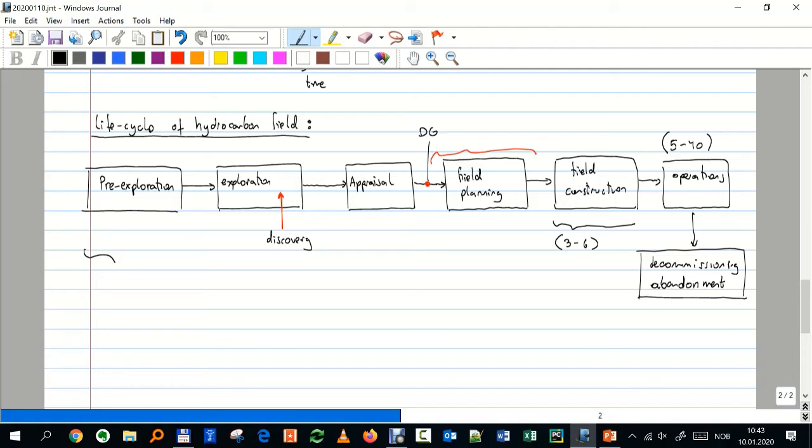Did you have any kind of economy project management course where they talk about decision gate? No. Okay, DG stands for decision gate. And it's a process that I divide in stages. At the end of each stage, I have to have this decision gate, where I can decide to continue, I can decide to abandon, or I can decide to wait, or maybe redo one stage.